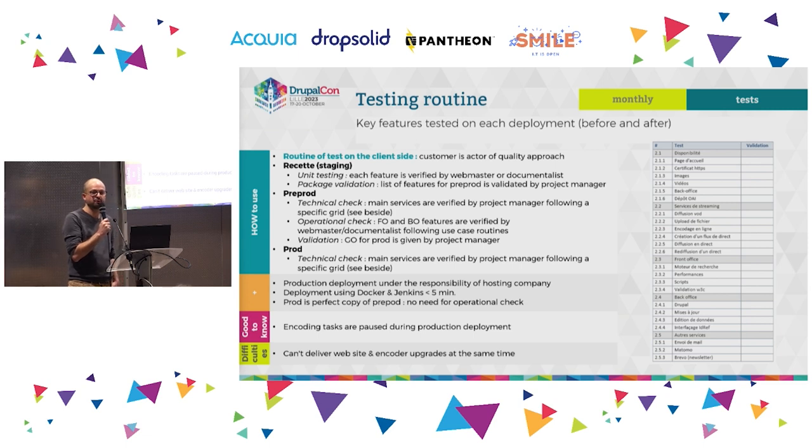After the pre-production deployment, I first make a technical check. I verify that each service of Can Lille is working well. For example, I check that I can encode a video, launch live streaming, receive an email from Drupal, write something on the database, and so on. For that, I use specific routines and also a grid, the grid that you can see here on the slide. This process takes me about 15 minutes.